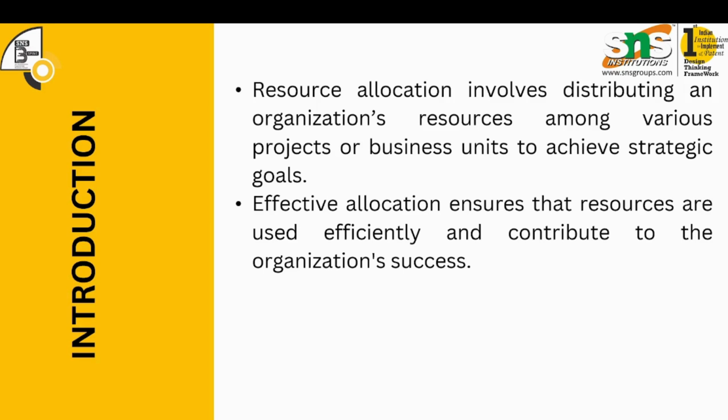Say, for example, one project requires only 4 people, but we allocate 8 people there. Would all the 8 be able to perform efficiently? No, because the work is being shared between 8 people. So all the 8 would only be 50% productive. On the other hand, if there were only 4 people doing the job, they would all definitely give their 100%. So it's very important that we are very calculative of the resources that are being allocated.